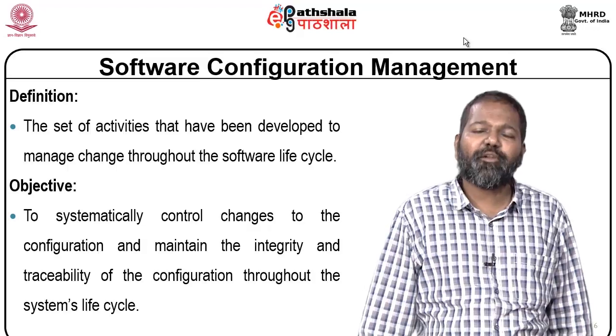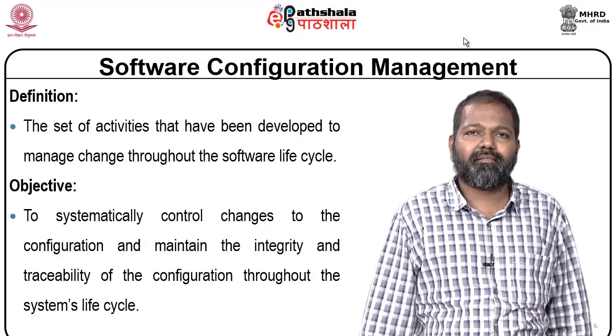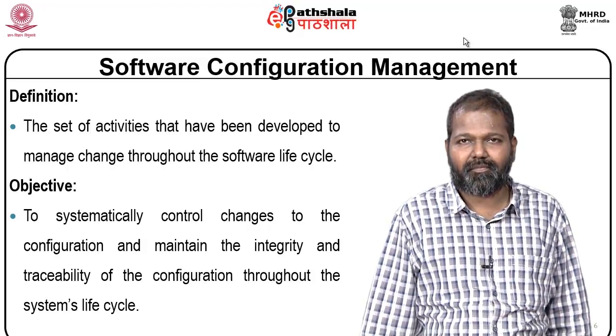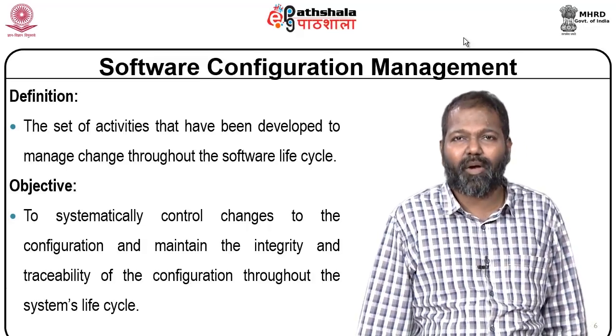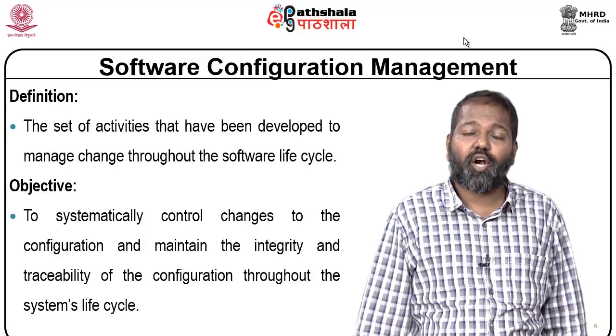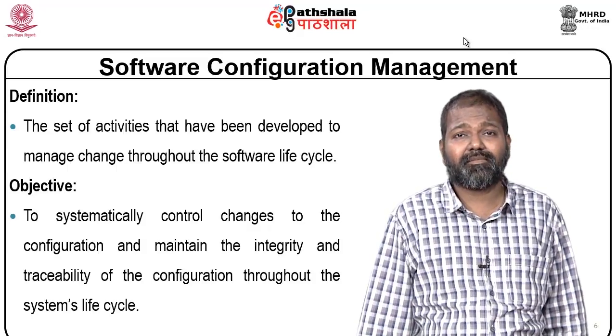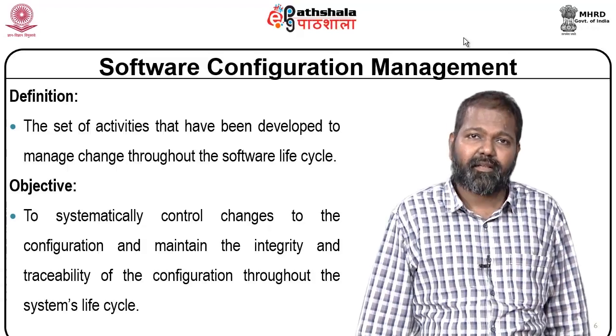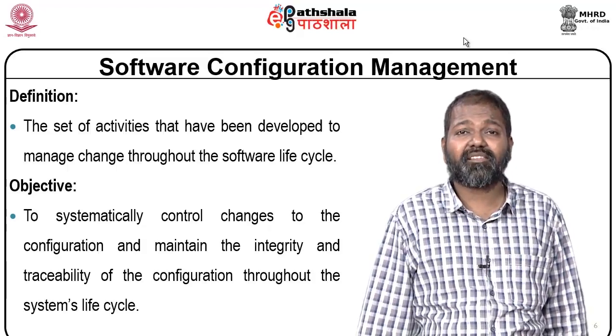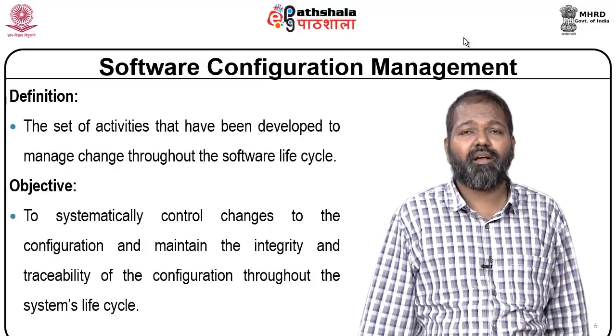Similarly, when you are in the coding phase and there is a change in requirement, when you address the changing requirement, not only does the cost get affected, the schedule also gets affected. Incorporating changing requirements sometimes may cause a schedule slippage.